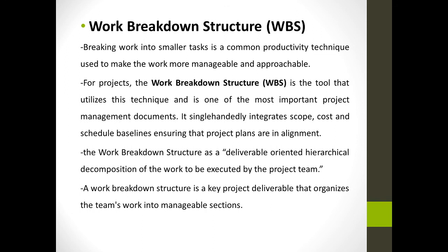It single-handedly integrates scope, cost, and schedule baselines, ensuring that project plans are aligned. If you are achieving schedule, scope, and cost, then the work breakdown structure is properly managed. The work breakdown structure is a deliverable-oriented hierarchical decomposition of the work to be executed by the project team. So, the whole project is divided into multiple small pieces and given to the project team. That is called a work breakdown structure.